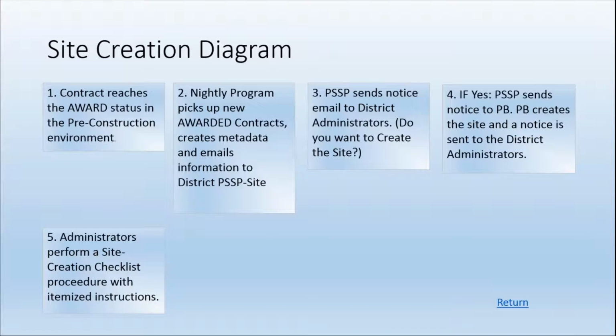Now, when that spreadsheet hits the district, it automatically notifies the administrators of the district, which is the Project Solve administrators, that they have a new request for a project to be put in their district. What they would do is edit the list that gets created when that stuff hits the site and reply in there that they want to create the site. And you would edit the record and say, yes, please create site. Once they edit that record and put yes in there, then Parsons Brinkerhoff is notified, and they take the steps.